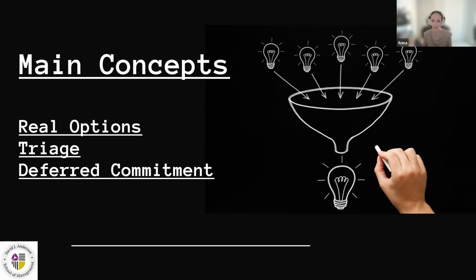And then the third main concept from Upstream Kanban is deferred commitment. The main quote comes from the book Commitment by Olav Maassen and Chris Matts, and it says that we shouldn't commit early unless we know why. It means basically we should defer commitment to the moment when we know that this is the point in time where we should start.